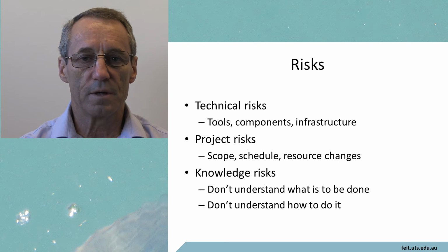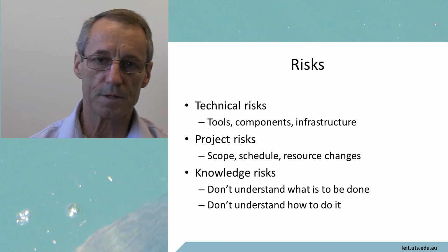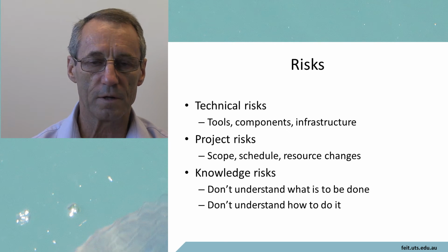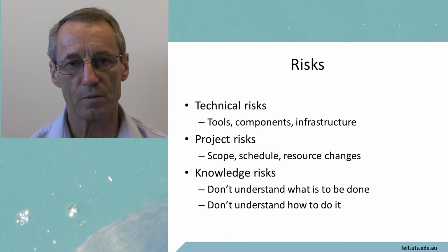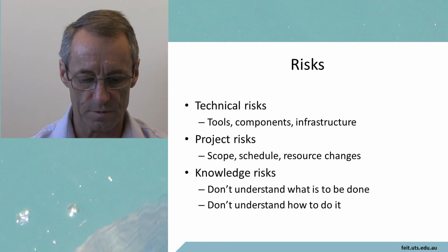Risks, you should identify the risks. Now there are technical risks, that is the risk coming from tools, components, infrastructure, that kind of thing. Are they present? Do you know how to work them? Is a new release coming out? Are they reliable? These are the risks of those.